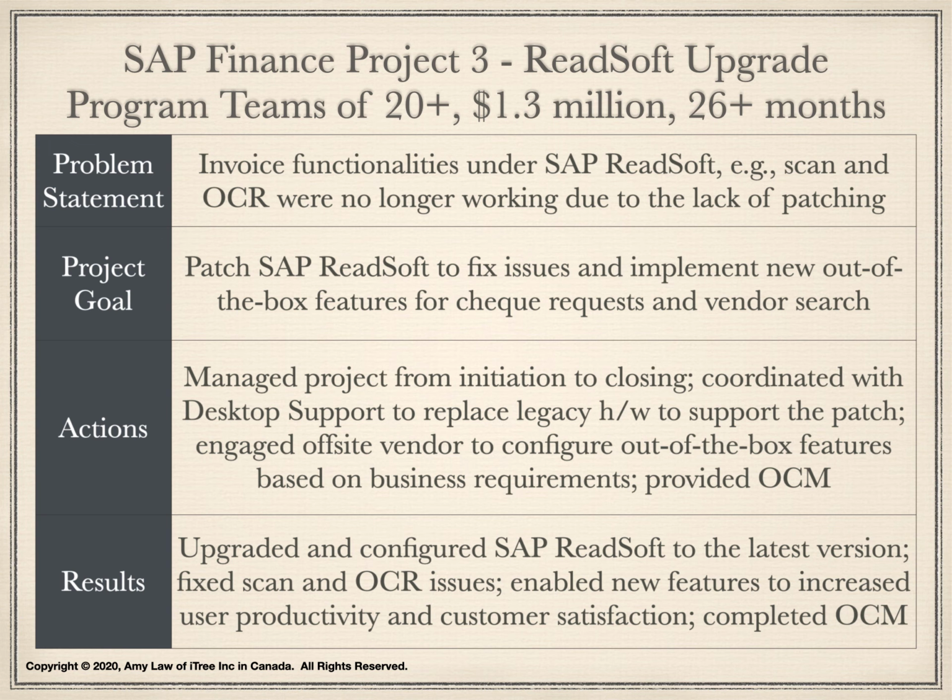I engaged the sponsor and champion to identify and evaluate several options to address the issues. We considered to upgrade an existing SAP add-on tool, ReadSoft, or switch to a new tool, or do nothing. Through a procurement evaluation, we decided to upgrade ReadSoft, which includes a replacement of the legacy hardware, like a refresh to the old server, and upgrade to a more powerful RAM.